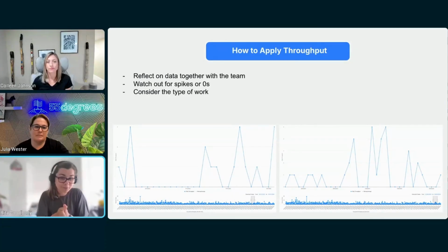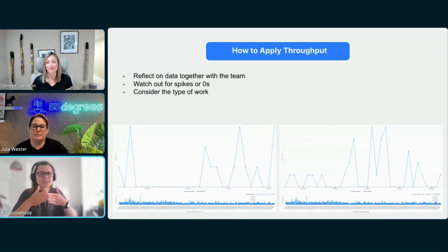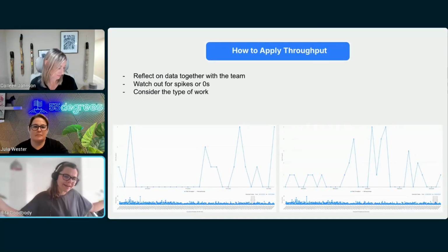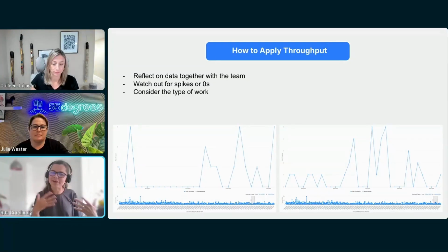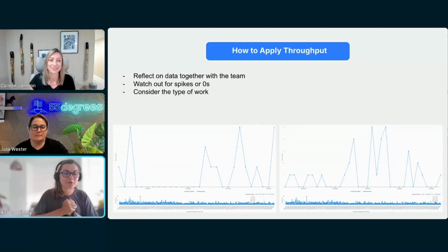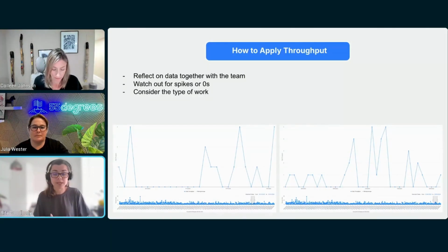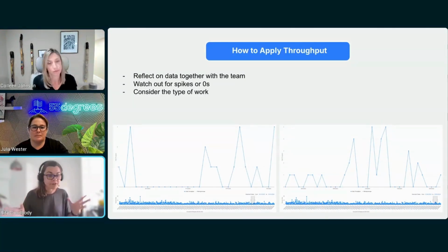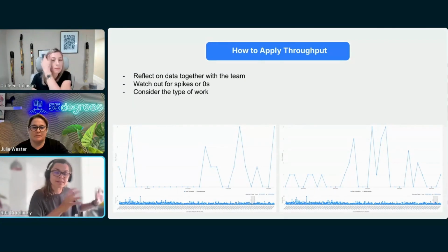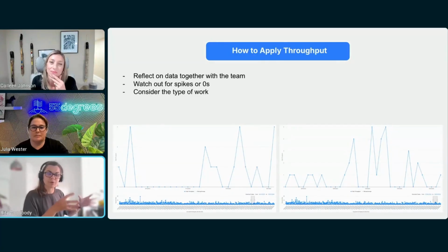This is real data from my team. So you see the very long zero line. That's Christmas, because everybody likes time off. So when we forecast and we come in January and someone asks, well, when will something be done, we need to be very creative and say, okay, let me look at last year when something very similar to what we are about to work on happened, so I can take data from that and forecast on that.